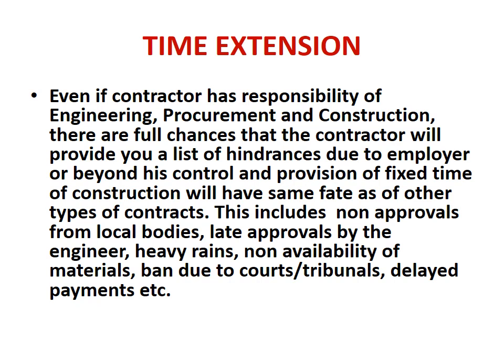Then let us talk about time extension. Even if the contractor has responsibility of engineering, procurement and construction, there are full chances that the contractor will provide you a list of hindrances due to the employer or project manager, and hindrances which are beyond his control, even if a provision of fixed time of construction is available in the contract.